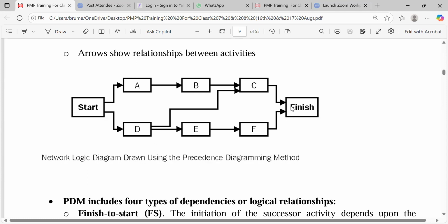Now, there are 2 different ways we can identify the critical path, and the first one we've talked about is the longest duration. Why is it critical? Every activity on that path, you don't play with it. If you mistakenly play with activity A and it turns out to be 5 days, the project will be 13 days. True or false?